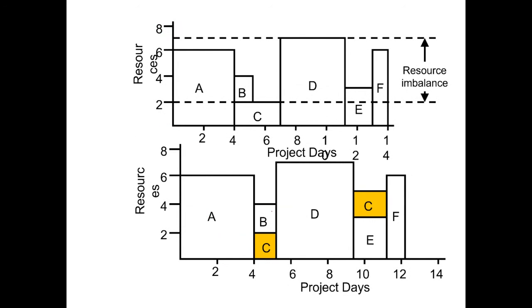So the decision made here, if possible: we have spoken to the contractor and they have given us a green light that they will be able to split it into two different phases, where they complete the first phase from week 4 to 5, and then the leftover work would be completed in weeks 9 to 10.